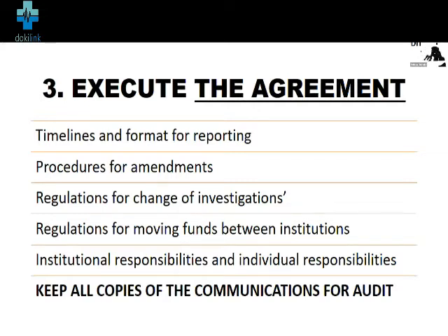It's also important that you look at the agreement, because nothing is cast in stone. For example, we find ourselves in this COVID era, inflation and a lot of things have come. And maybe you had written a budget some 2-3 years ago. Prices of things have changed. There is need to get more funding. Does the agreement state that you can approach other donors or not? That must be clear. And from the agreement, usually they would state the procedures for amendment.